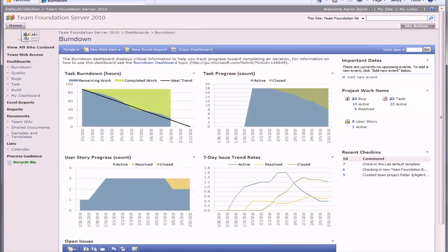But because of the multiple perspectives that TFS offers, I can also look at a report like this that shows me my user story progress. The blue user stories indicate user stories that are still under active development. The yellow or orange ones represent ones that have been signed off by the dev team and now are up to the test team to validate and close out. When I look at this graph, I actually don't feel so good about the status, because we're getting towards the end of our iteration, and we haven't gotten to the point that we have large blocks of code that can actually be tested end-to-end by our testers and our stakeholders. This might give me an indication that I need to ask my developers to stop doing a little bit of work over here and spreading it all over the place, but instead really focus on closing a user story or two that we can actually hand off with high confidence at the end of the iteration.